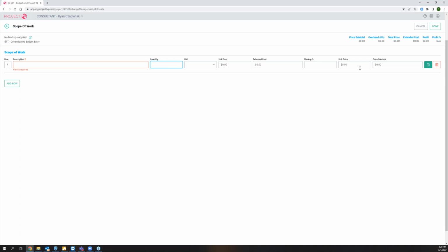The third thing we're accomplishing here, so the totals, the line items that are going to show on our form, and then the third thing is what we call our budget impact. In Foundation, we call it distribution. Here we call it budget impact. Again, potato, potato, it's the same thing, just got a different name to it. What we're doing is we're taking the cost of our change order, however much my total estimated cost is going to change by, and we're breaking it down into our budget.